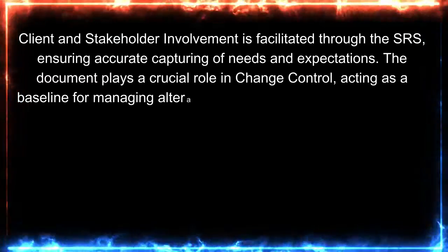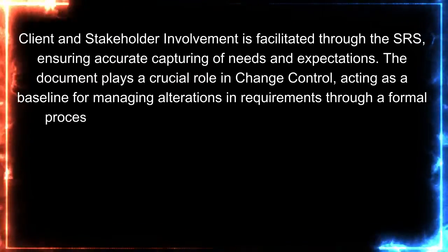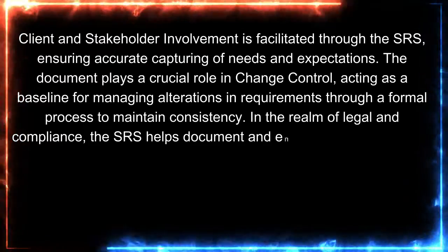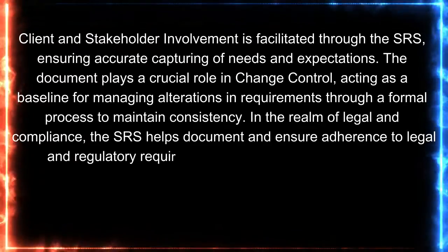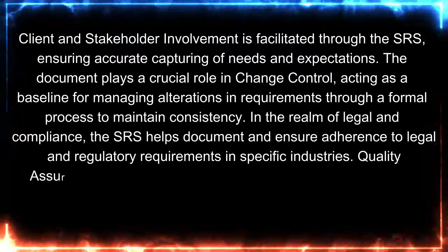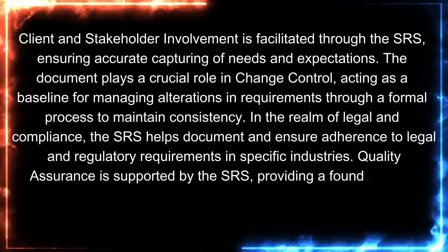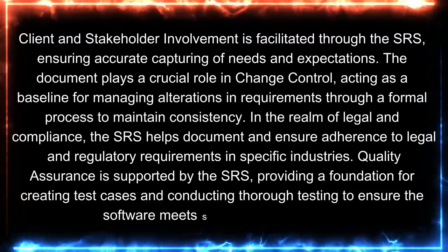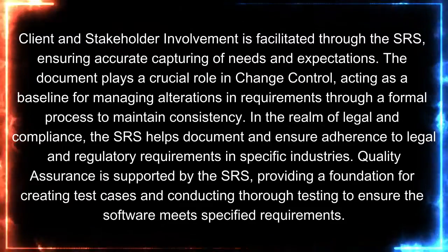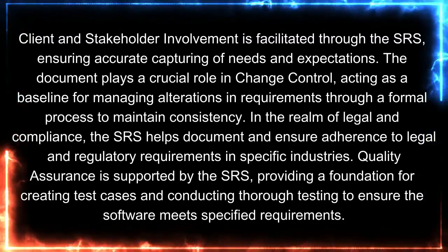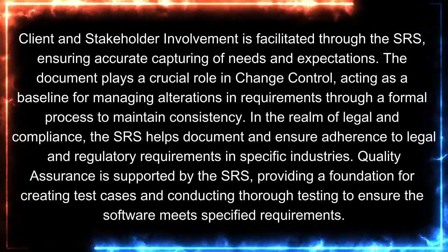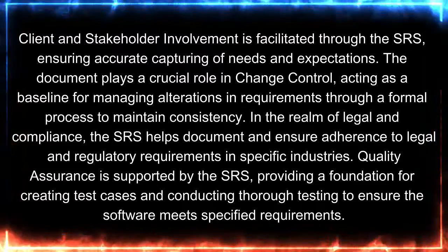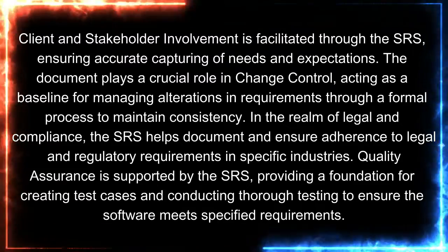The document plays a crucial role in change control, acting as a baseline for managing alterations in requirements through a formal process to maintain consistency. In the realm of legal and compliance, the SRS helps document and ensure adherence to legal and regulatory requirements in specific industries. Quality assurance is supported by the SRS, providing a foundation for creating test cases and conducting thorough testing to ensure the software meets specified requirements.